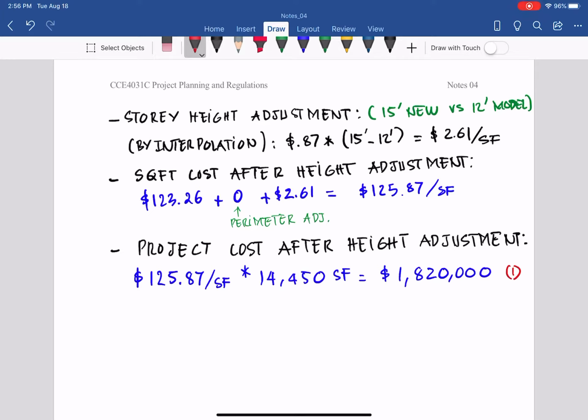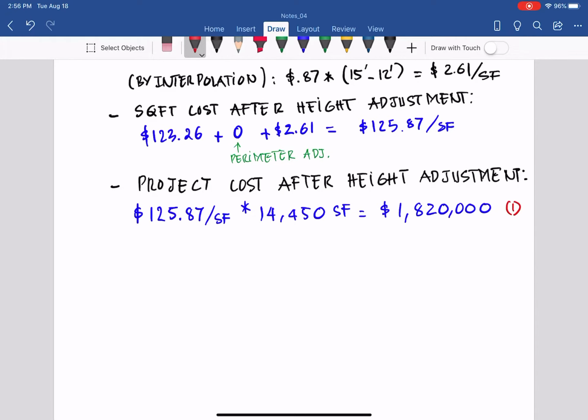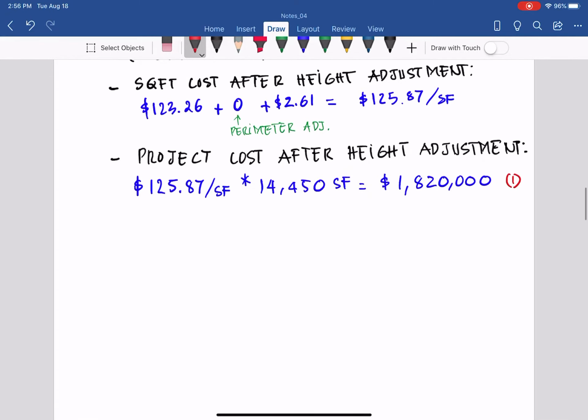So you don't have to come up with a level of accuracy like a few dollars or a few cents, which gives people an impression that you make a very, very accurate estimate, given that the method cannot achieve that level. So round up to 10,000, 100,000, etc. So that's the first one.